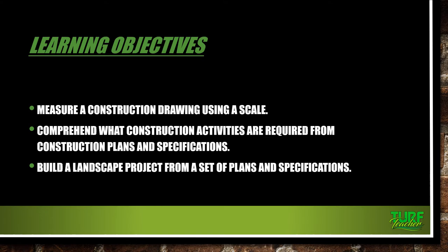Or are you providing both landscape and irrigation? Or are you only doing landscape? A lot of times, these contractors are going to submit bids to the landscape contractor, and they're going to leave it up to you to get the quotes on the irrigation. It may be included in the whole umbrella of landscape work, and so you may be responsible for having to hire that irrigation contractor. That's why you need to read those specifications.